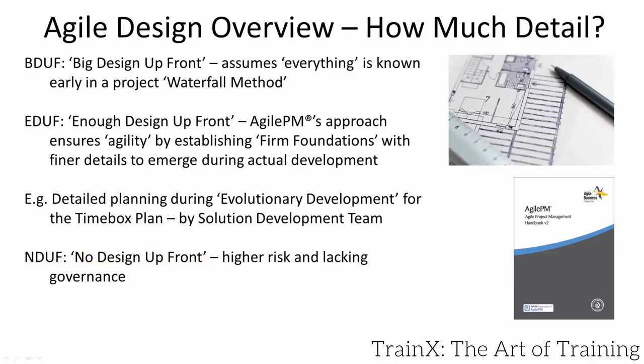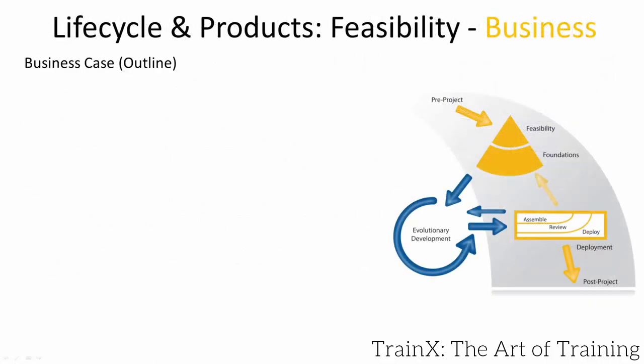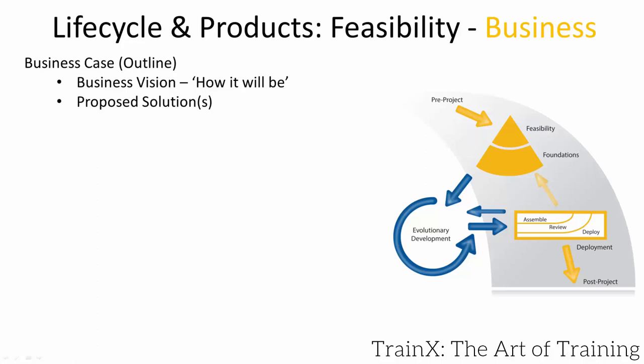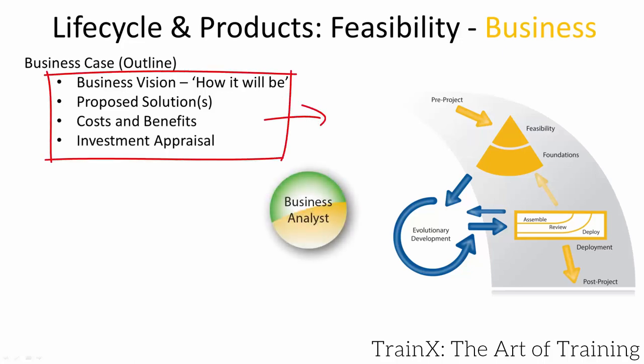The business sponsor owns the business case, which contains the business vision — how the organisation will work after the project has been delivered. In our case, booking a room is now seamless, 100% accurate and can be done from anywhere. The proposed solution, a web-based booking facility, is described along with possible variations, each with its own costs and benefits. The investment appraisal details how the project will generate more value than it costs to deliver.